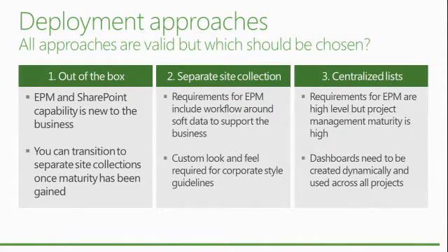Anyone else? Yes? Well, if it does bring over the custom project fields, so are you talking about the custom task fields that it doesn't bring over? No, so we're purely talking about SharePoint data. So we're talking about risks, issues, lists. You're right. It does bring through your custom task fields, your project level fields, and your resource level fields, and you can configure the cube accordingly for your project data. But when it comes to the SharePoint data, you can't configure the cube to bring through the risk data and things like that. Okay.